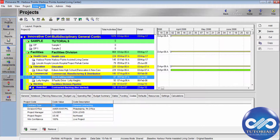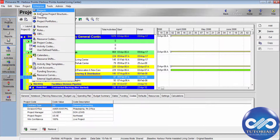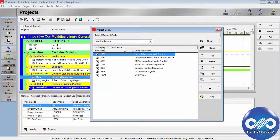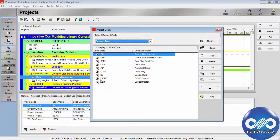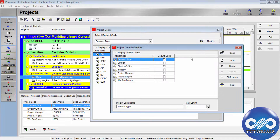First, go to the menu bar and click on Enterprise, then select Project Codes. By default, these are the project codes, and if you select one, these will be my project code values and this will be the code description. Click Modify in the project codes dialog box and then define the project code definitions. You also need to add values to the project code. Click Close in this project code definitions dialog box.